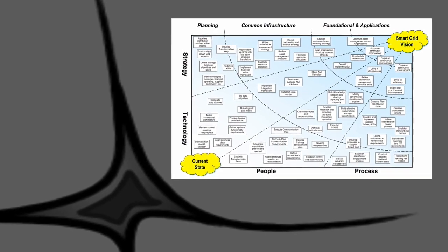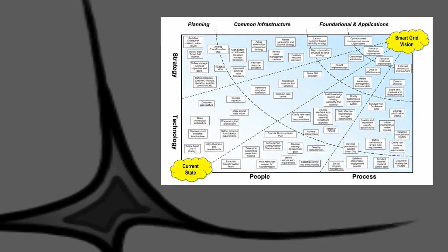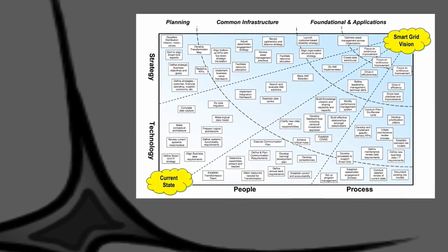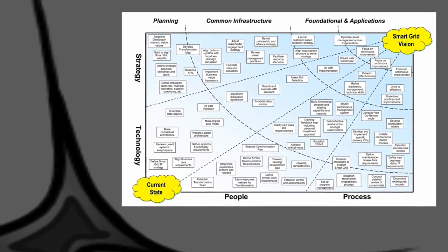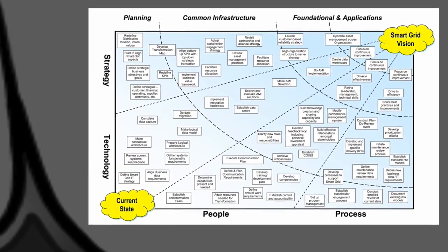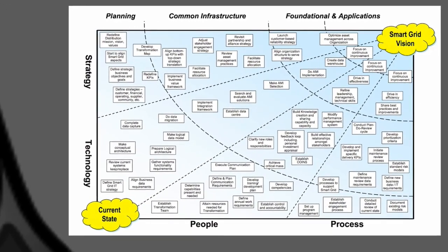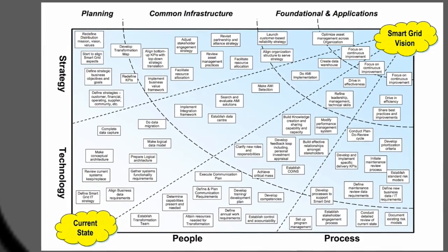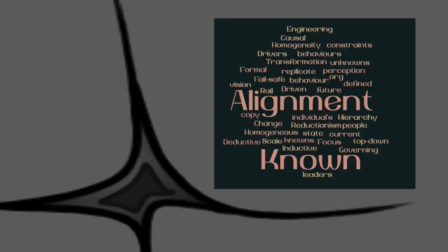We began by crafting a smart grid vision, then broke into people, process, technology, and strategy teams. Each team worked independently to define their deliverables in a phase of the transformation. Finally, we came together and moved boxes around to build an input-output timing sequence.